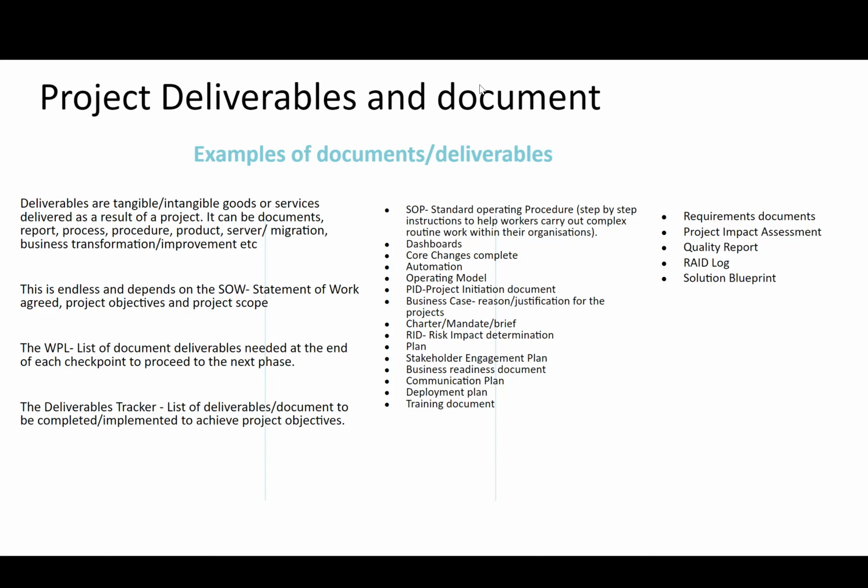You have your project charter, and that just documents the brief that you have been given. It documents your mandate, let me just put it that way. Okay, go and deliver the website project. You document that, you have a summary of it, you can have your resources on it. You have risks that have been identified, your costs, and those key milestones. I've been mentioning milestones, and I'm not sure if I've explained that. So milestones are those key highlights of your project. That is what we celebrate, let me just put it that way. So we have 5 phases of your project now. At the end of your initiation phase, that is a key milestone.